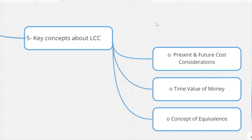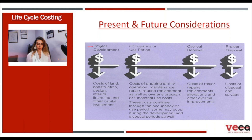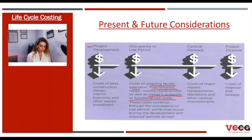The first key concept is present and future consideration. For a project, we have several types of costs: project development, occupancy or use period costs, cyclical and renewal costs, and project disposal costs. Regarding project development, we have the cost of land, construction, design, interim financing, and other capital investment. Regarding the occupancy and use period, it presents costs of ongoing facility operation, maintenance, repair, routine replacement, as well as owner's program or functional use costs. This cost continues through the occupancy period and some may occur during the development and disposal period as well.